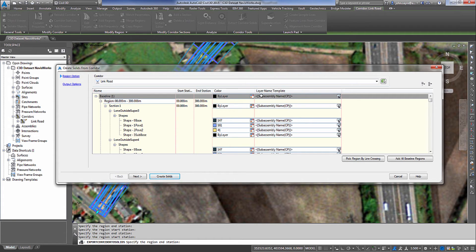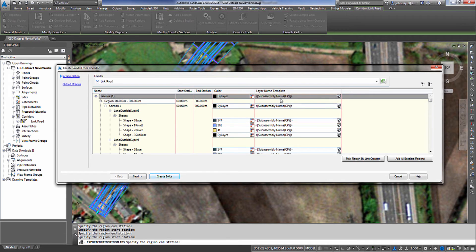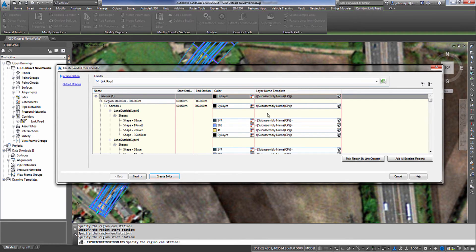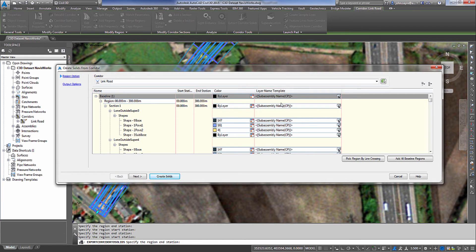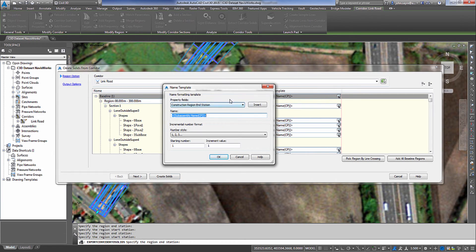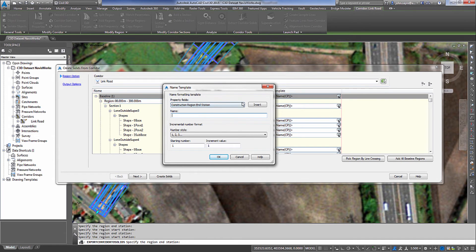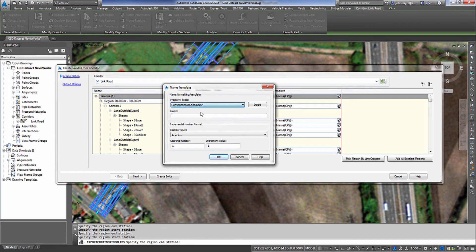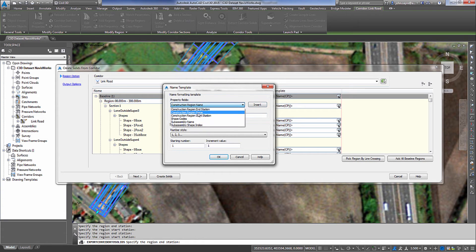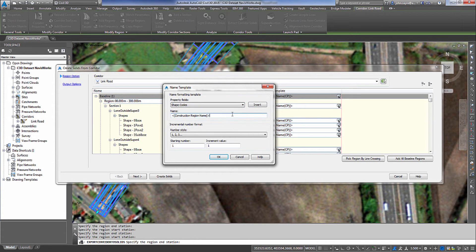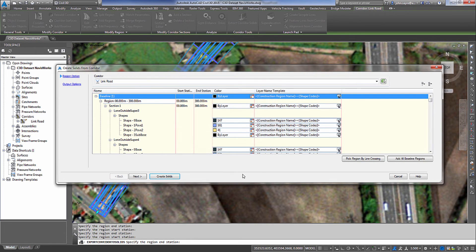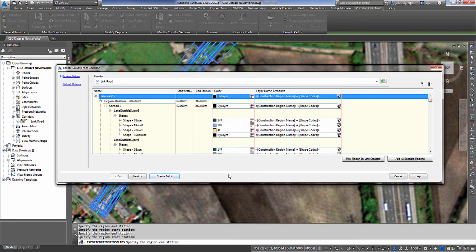So I want to use a specific naming convention on those layers. So I'm going to change it for the baseline and it will automatically populate all of my regions that I just created. So I'm going to select inside that box and I want to show my construction region name and then I'm going to break it down by shape code. I select OK and it automatically updates all of my layering name convention.